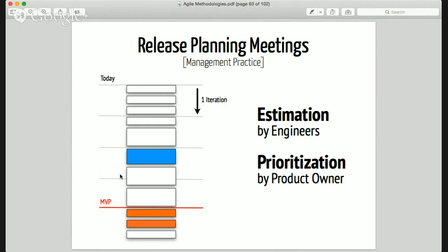They are responsible for product managing and prioritizing all of the features that are going to be built in software. Whereas if you're wearing your development hat, you're an engineer in the group, then your job is to estimate as accurately as possible how long it takes you to finish a portion of the project. So all of these boxes represent some unit of time, and I'm going to estimate according to those units to say how long it's going to take. So for example, in Orbital, a week's worth of time might be one box.